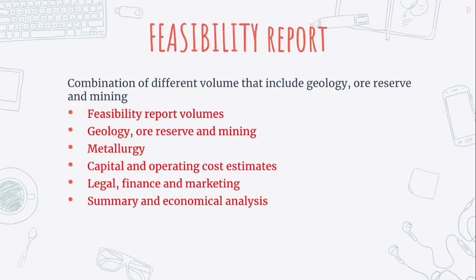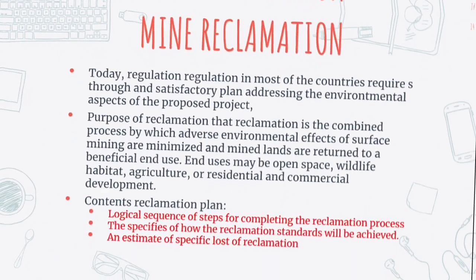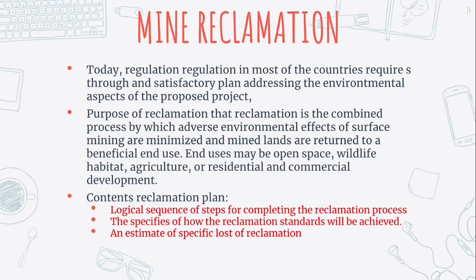Feasibility report is a combination of different volumes. It includes feasibility report volumes: geology or reserve and mining, metallurgy, capital and operating cost estimates, legal, finance and marketing, summary and economic analysis, and mine reclamation, also known as rehabilitation.